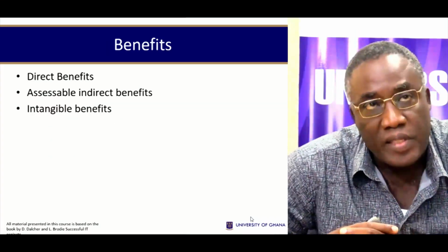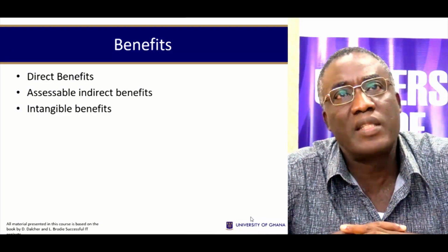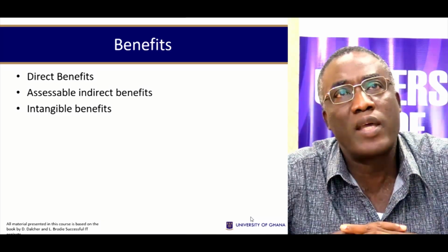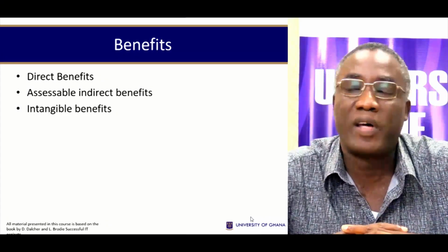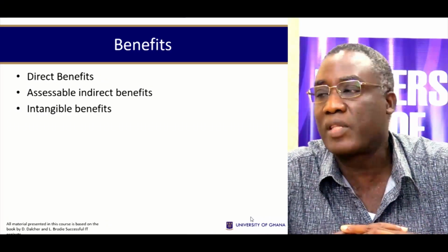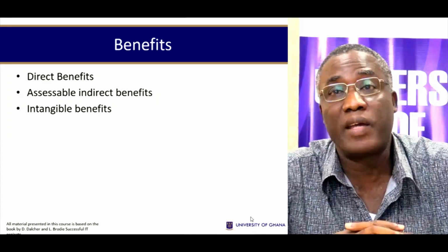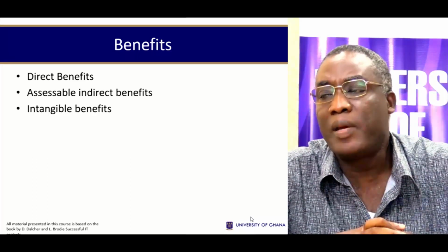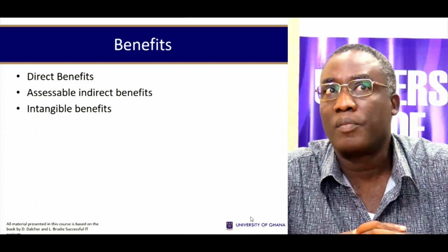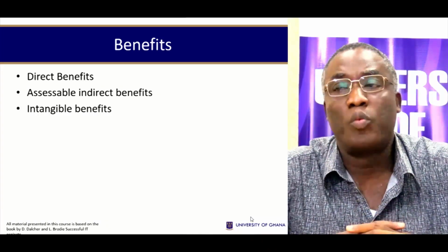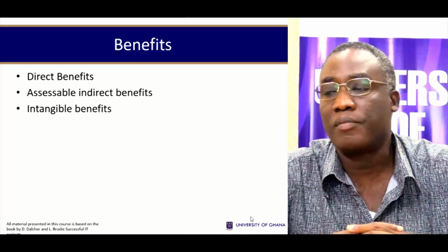Now, benefits. We said earlier on that if you invest in any project, it's because you are expecting some benefits. Benefits can be quite difficult to quantify, sometimes, especially in monetary terms, even if you're able to identify them. We can classify benefits in 3 major ways. Direct benefits. These come directly from operating the new system, e.g., increased revenue generation.